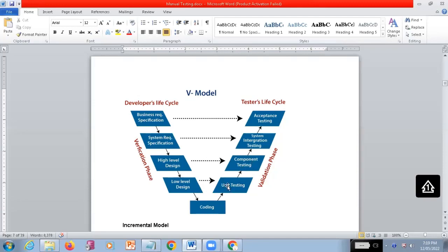Because if you find the particular issues after this phase, they have to come back to the requirement phase, correct the system requirement document, correct the design of the system, develop again, and retest again, and only then will it come back to you. Like this, a lot of time is going to get wasted and a lot of resources are going to be utilized for this.